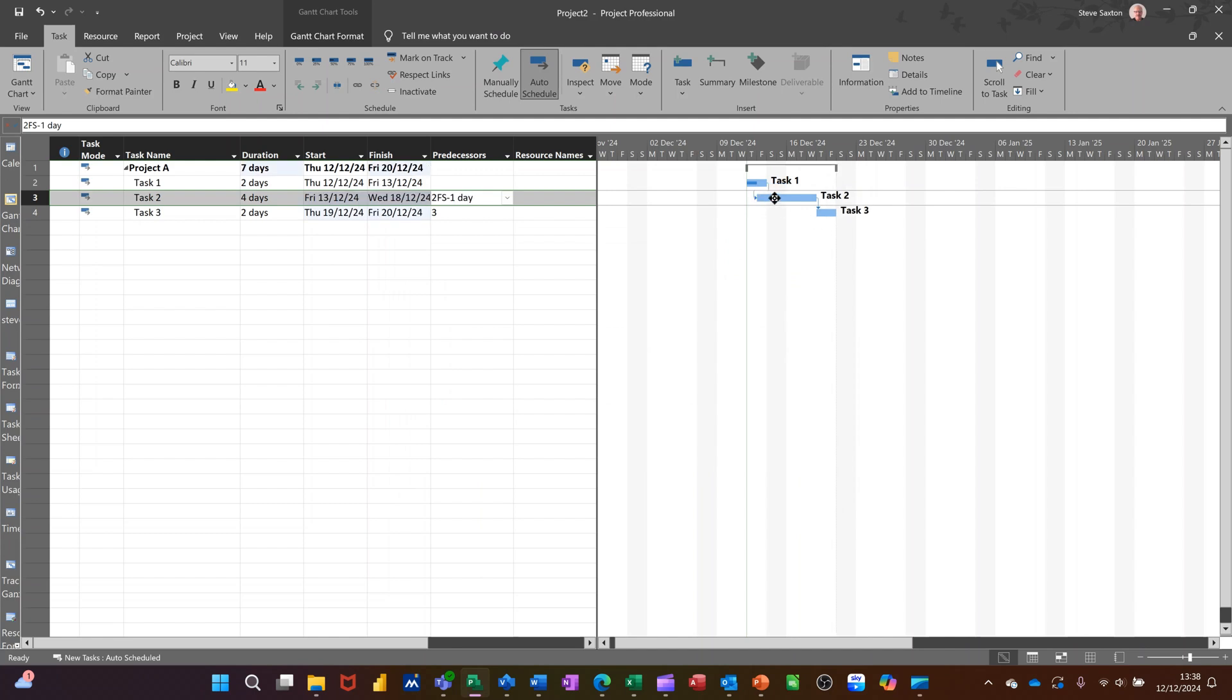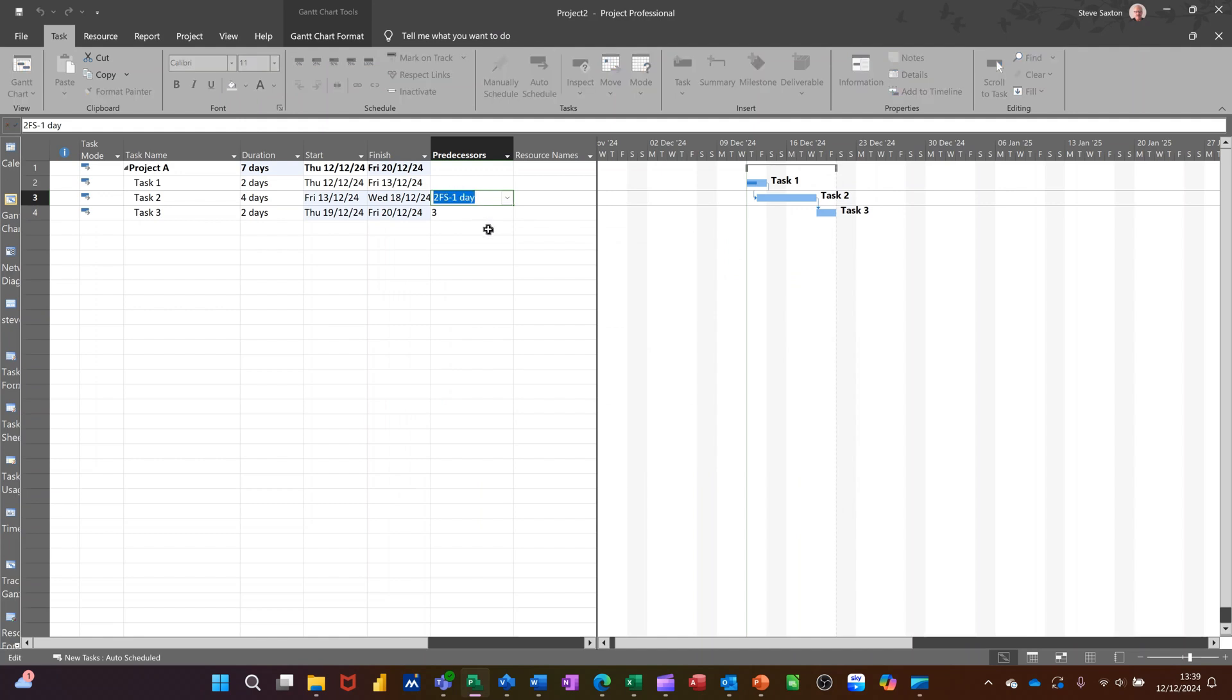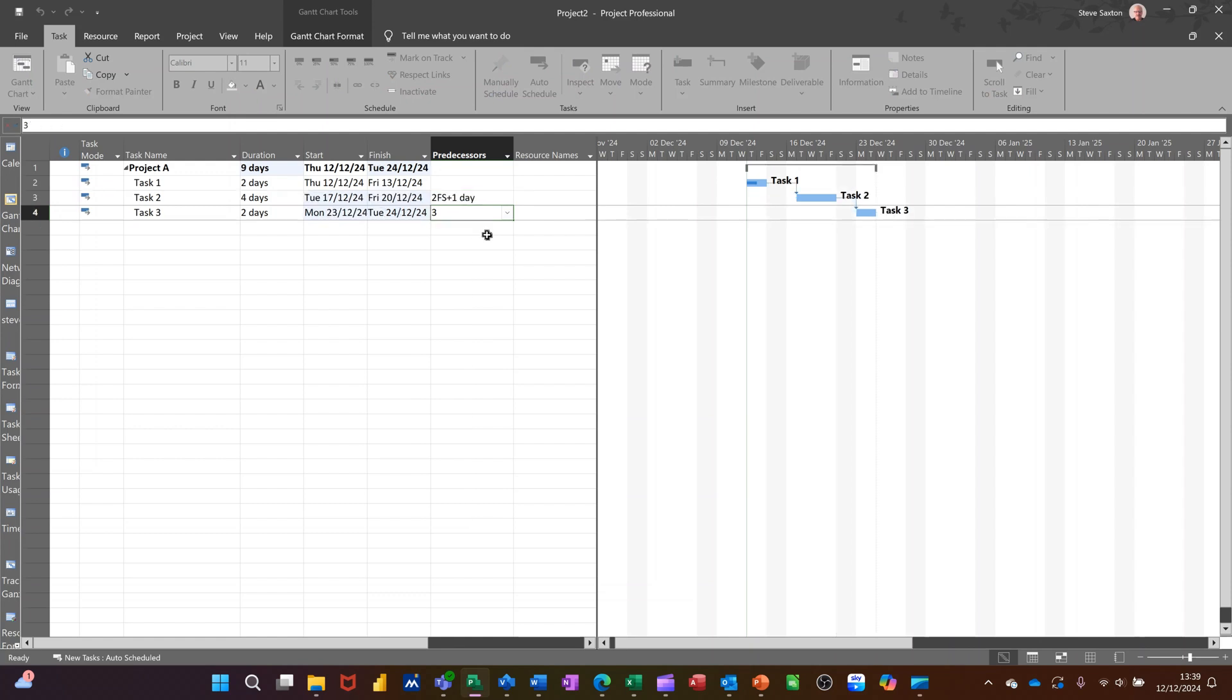You get the same sort of thing happening. And again, you can see the words I've put there. So if I put a positive number there, I'll go 2FS plus one. 2FS plus one D. It'll go the other way. You get the gap. So both of those two packages are pretty similar in what they can do. Quite cool.